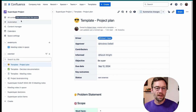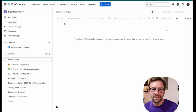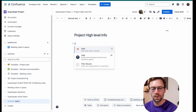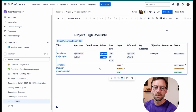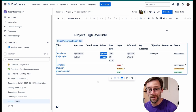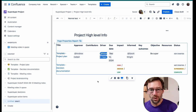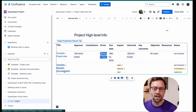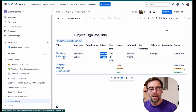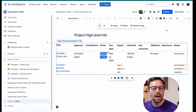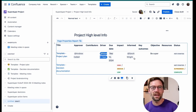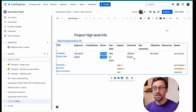I can then pull that page properties info into a single report to show every page property across a space. I'll make another page called 'project statuses' and include the page properties report macro. Right away, information pops up — and as a project manager, this is incredibly useful. If I had multiple projects I'm managing, I could quickly pull this together and update individual pages to see their status. I can give this to stakeholders so they can quickly see who's approving this, what's the status, and where they as a stakeholder need to take action — freeing me up as the project manager.